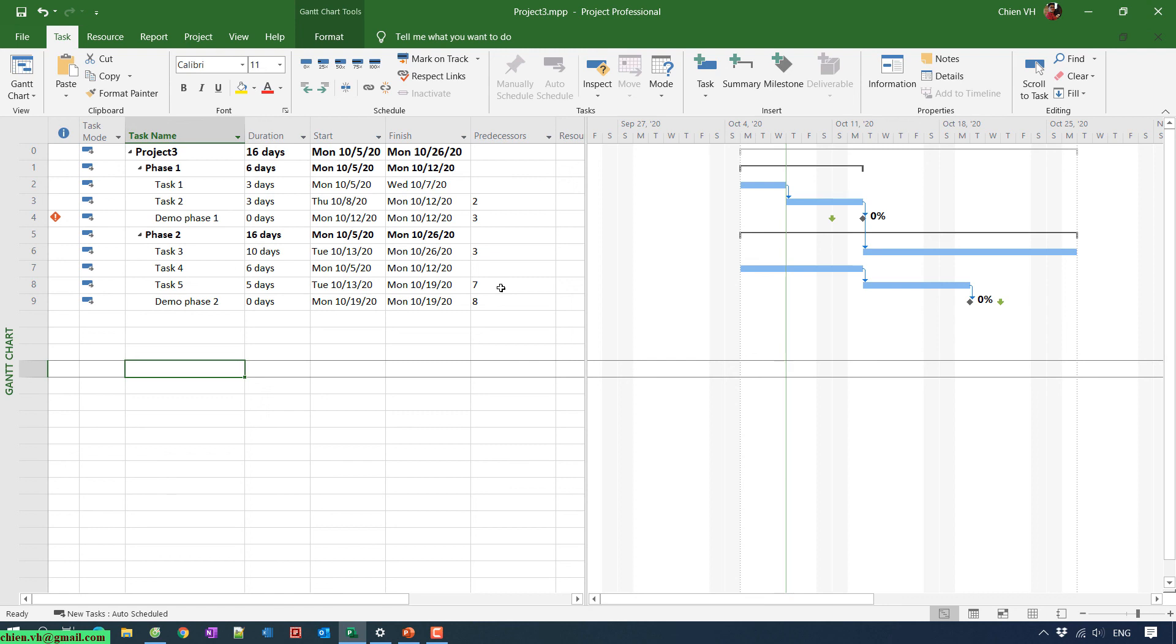So when the task or the milestone runs over the deadline but you still not finish it, it will display a warning message in red color in the indicator column to show that your project is behind schedule. So thank you for watching, bye bye, and see you guys in the next video.